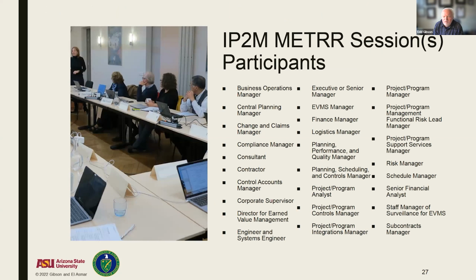So one of the things that we really feel strongly about is that if you're going to do an evaluation using the IP2M meter, you can certainly do one with one person sitting in a room just filling out the software. But the reality of it is you get a lot more for your buck if you've got the right people sitting in the room. And I think it depends a lot on the project or program and where it is in its life cycle, but you would probably want to have a combination of the following folks that are shown on this slide to do that assessment, because what you're trying to do is get a 360-degree view of where you are in terms of your environment and also in terms of the maturity of your systems in place.